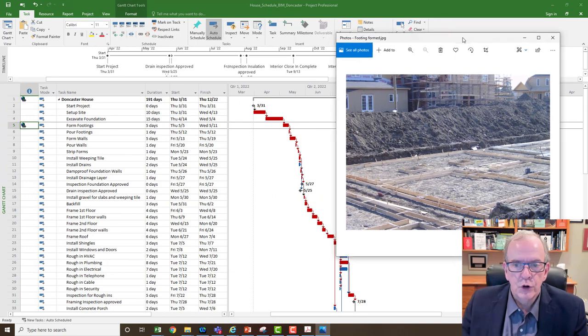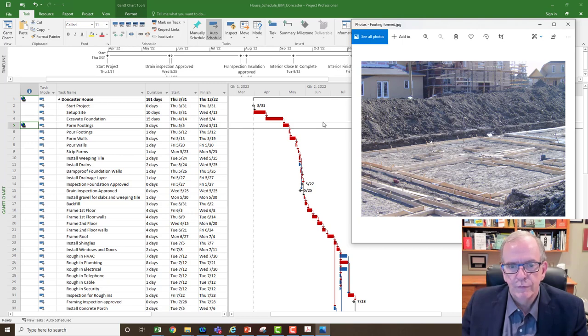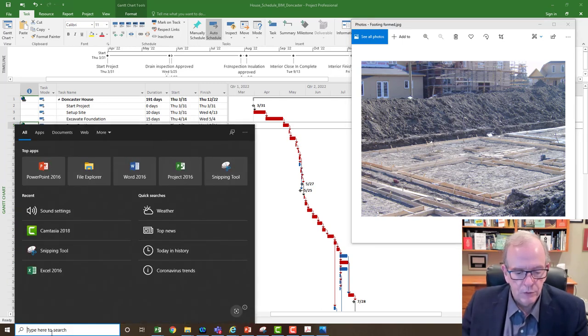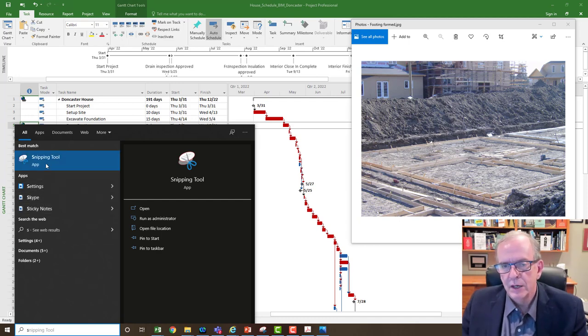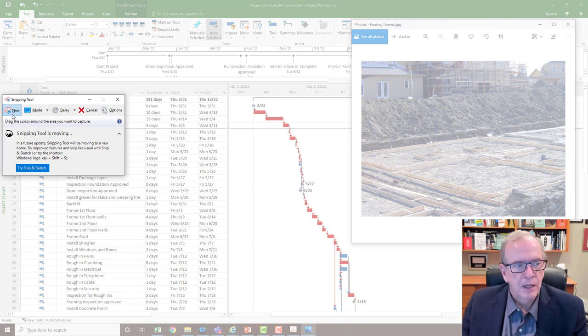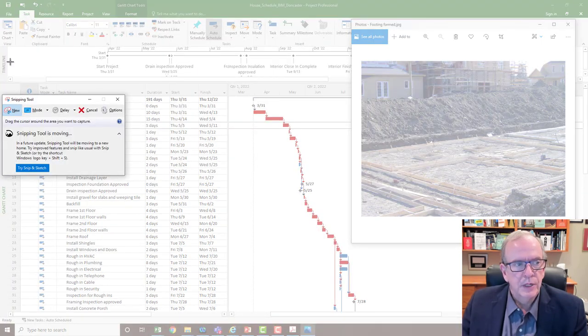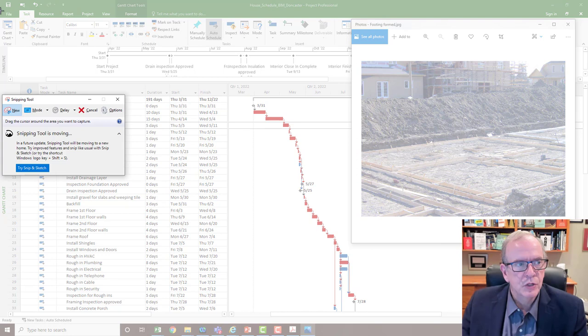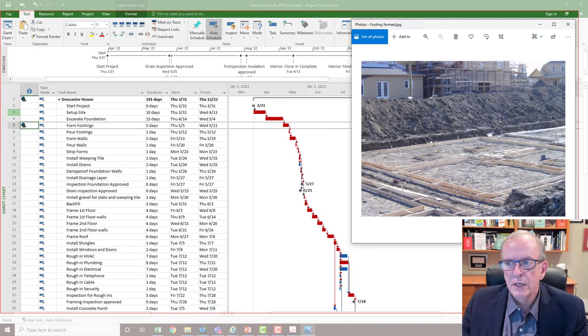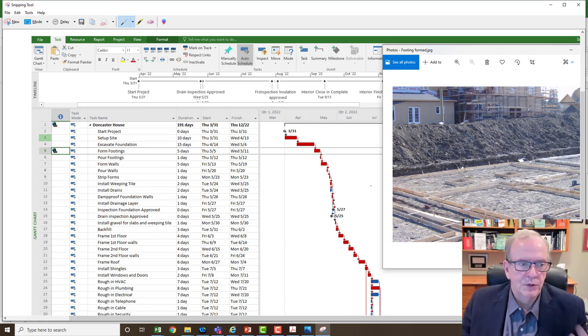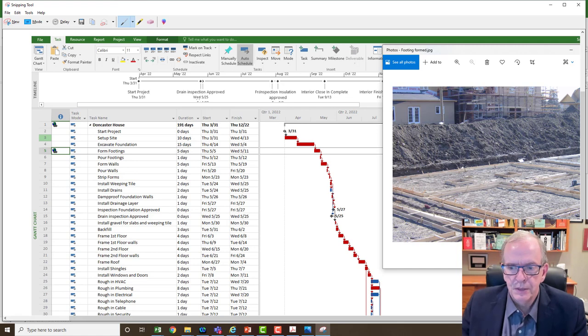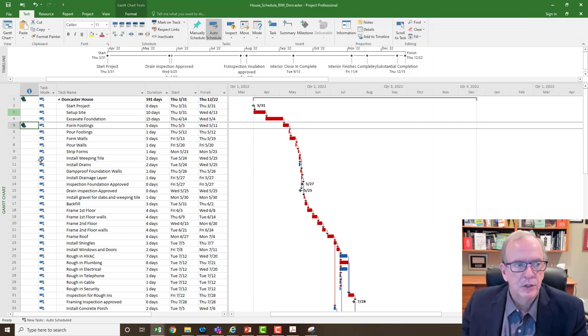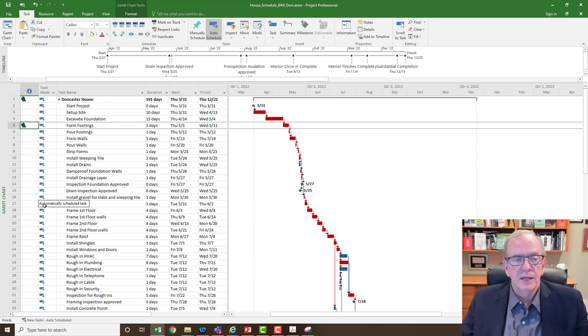So if you were trying to explain something, or maybe you also wanted to get a screenshot and you wanted to show the footing and show that this is done, you could even highlight this in a different color and go to the snipping tool. If you use some of the other snipping tools that are available, that can be helpful too. I'll just click new and that'll bring up the screen. Then I could take a screenshot of my schedule with the image built into it. If I was going to send that to somebody to show this has been completed, I've easily done it and connected it to my actual document. So I could have a whole bunch of as-built photos as I upgrade my schedule, which can be really helpful.